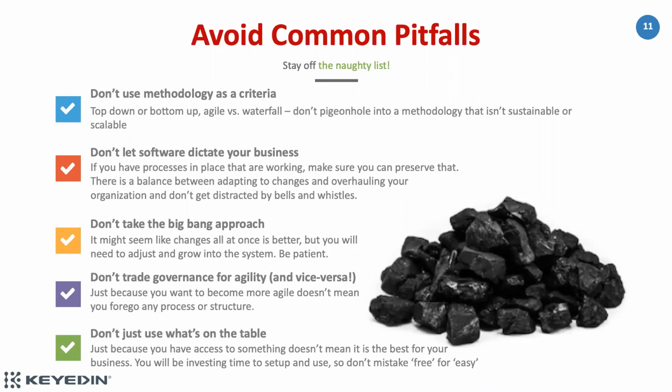One guideline that I like to recommend is that if you're rolling out a PPM solution, you're planning an integration, maybe keep that integration very simple up front, or keep that for a phase two. Start off with manually integrating until your processes stabilize and your assumptions can be confirmed, because that can often be a real challenge to go in and re-engineer integrations once you change your processes.